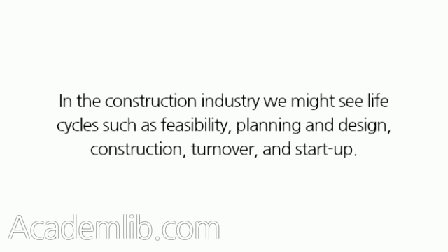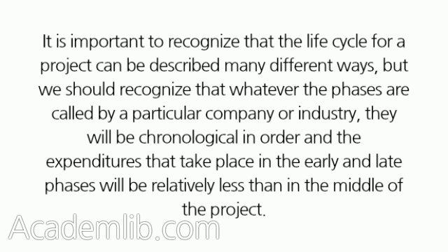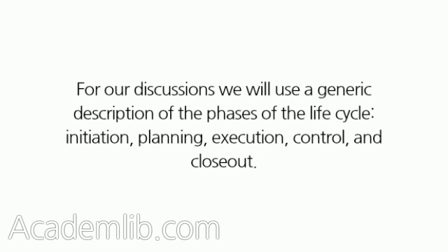and startup. It is important to recognize that the life cycle for a project can be described many different ways, but we should recognize that whatever the phases are called by a particular company or industry, they will be chronological in order, and the expenditures that take place in the early and late phases will be relatively less than in the middle of the project. For our discussions, we will use a generic description of the phases of the life cycle: initiation, planning, execution, control, and close out.